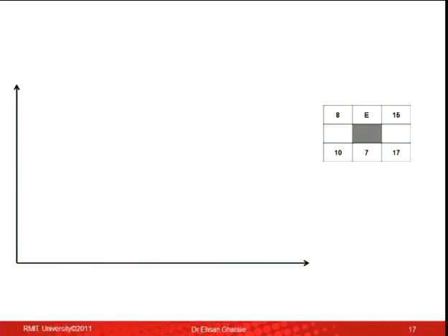Okay, so now let's go back to the critical path method and this new concept. It's not new, we've touched upon it, but now we want to put a name for it. So let's say this is the activity box. It says the earliest start is 8, early finish is 15, latest start is 10, late finish is 17. So I use a bar chart to see what this box is talking about. Let's say this is the earliest start day, 8, that's 15. So the activity can be done here between 8 and 15 on a bar chart.